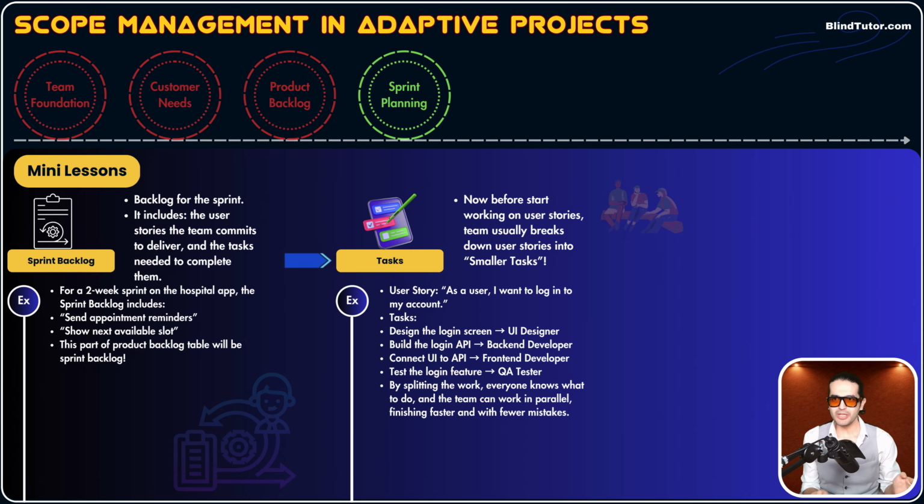Yeah, we said the smallest size requirement is a user story, but if a user story is still too big and that user story needs the involvement of, for example, UI, tester, developer, all at the same time, we could break it down into smaller tasks. So each team member does one task. Okay, based on their skills and their expertise, they can pull tasks to complete that user story. So tasks is another concept that you could consider. And guys, feel free to read the examples because I think these are obvious. I don't want to dig in further and waste time here.